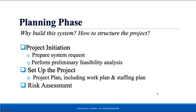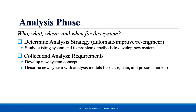The first step, the planning phase, is where we ask the questions: why are we building the system, and how are we structuring the project? This phase includes project initiation — talking to different people and understanding the reason for the project. We also prepare a formal document called the system request and do an initial feasibility analysis. Finally, we produce the project plan, work plan, staffing and resource requirements, and a risk assessment, which is presented to the steering committee.